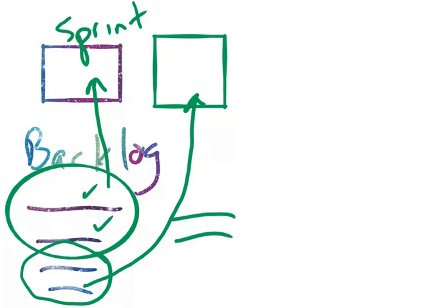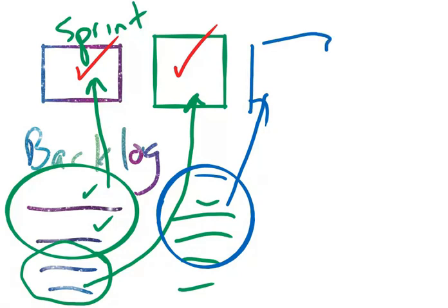In the meantime, additional items will be added to the backlog. Usually you don't start with 4 items in your backlog. You probably have tons of items, maybe 50 or 25 or so. In each iteration, or each sprint that is about 2 weeks long, we're going to complete that and hand it over to management. So at every phase that you see here, there are incremental benefits that come to management, right? At the end of this, from the remaining items here, we can formulate a new sprint for another 2 weeks and work on it and complete it. With every phase, we're completing something of incremental value to the organization.